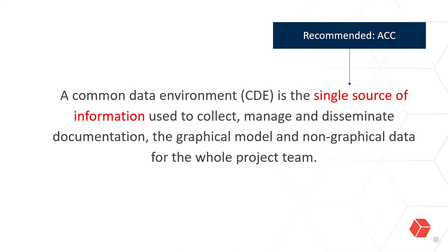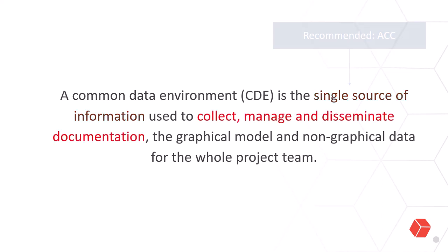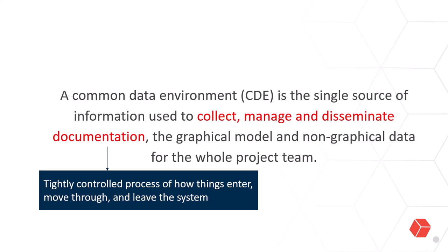It's also important to consider, when you're looking at a single source of information, if the application or the platform or the tool that you're using is aligned to building construction projects and not aligned to office administration, for example. Then further on, a common data environment is used to collect, manage, and disseminate documentation. So what this means is a tightly controlled process of how things enter, move through, and leave the system.